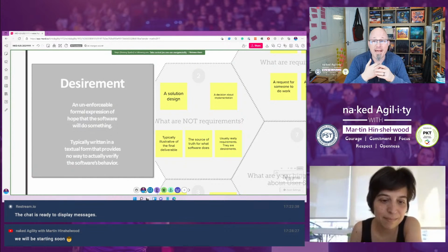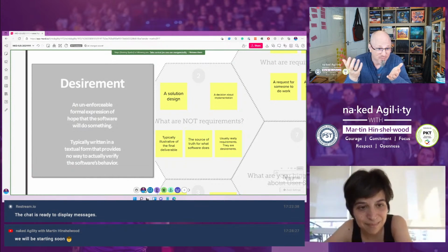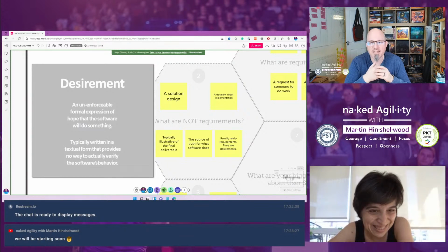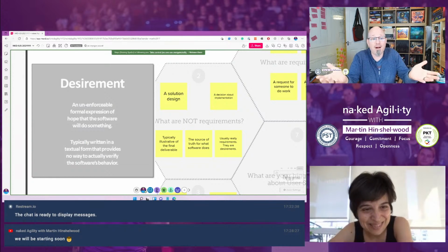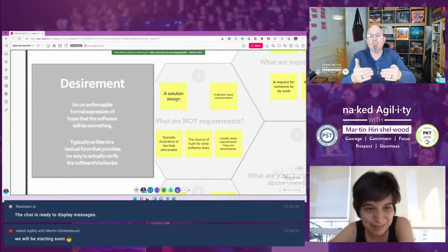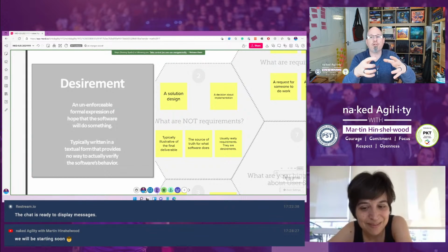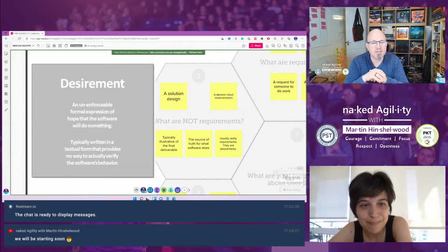And doing that planning poker exercise, where one team member says, "Oh, that's a 2, that's super easy," right? And another team member says, "That's a 21, that's super hard." Well, okay, we've got somebody knows something that somebody else doesn't. Let's have some conversations around how do we create a cohesive understanding across the team.